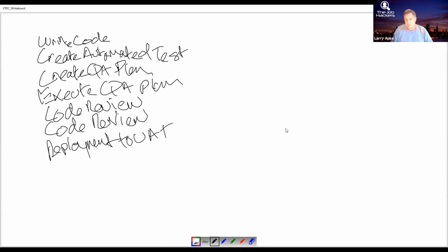You with me? These are all tasks that I need to do in order to make sure that whatever story I've got is done. And then the AC is particular to the story. That's how I accept it, right? The product owner is going to make sure that this acceptance criteria is done, as well as the definition of done. So these might be the tasks under a story.